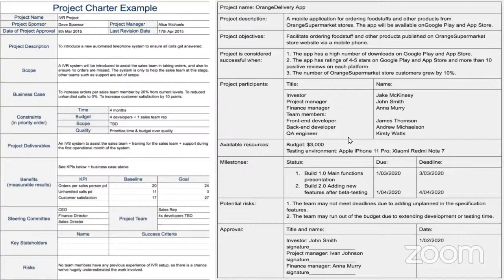So we can say at month 4, there is a major deliverable expected. At month 10, there's a major deliverable expected. At month 20, a major deliverable is expected. Then month 24, we are rounding up with everything. So you've given us also a high level time scale. The time scale, the timeline, is just the same thing.